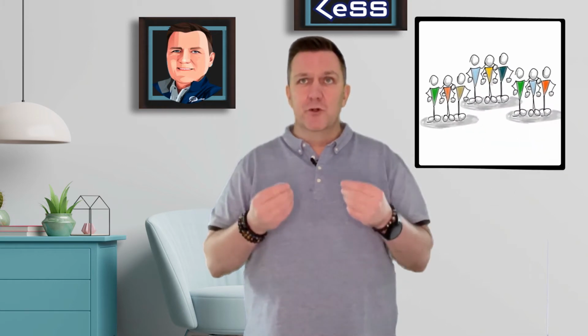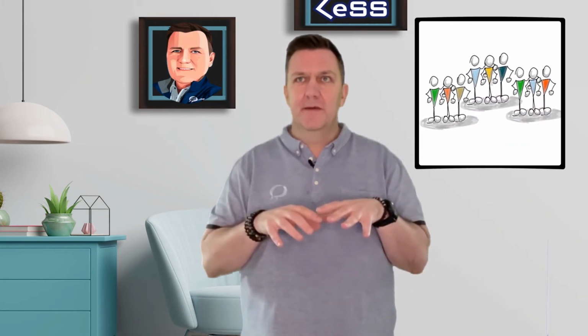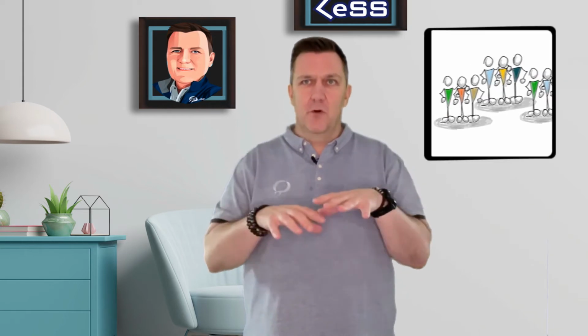It means we need some kind of multi-team scrum, for example. We have multiple teams that act as one. So they coordinate amongst themselves. They do all the work amongst themselves. They really work as one team, even though it's multiple teams. And they're all sitting behind one and the same product backlog, for example. If you want this kind of agility on at least the departmental level, then you need to look for frameworks that put multiple teams behind one product backlog. So now we have it on a departmental level.